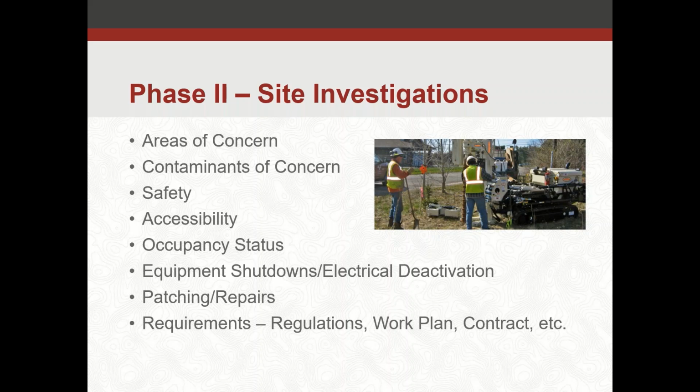Safety and accessibility, those are important. If we can't get to an area to appropriately assess it or safely assess it, then you have some limitations there. What can you do differently to work around those limitations? Sometimes you might just have to assume that you might have a concern there, put it in your project, and then at the time of construction, figure it out when you can implement measures to curb those safety concerns.